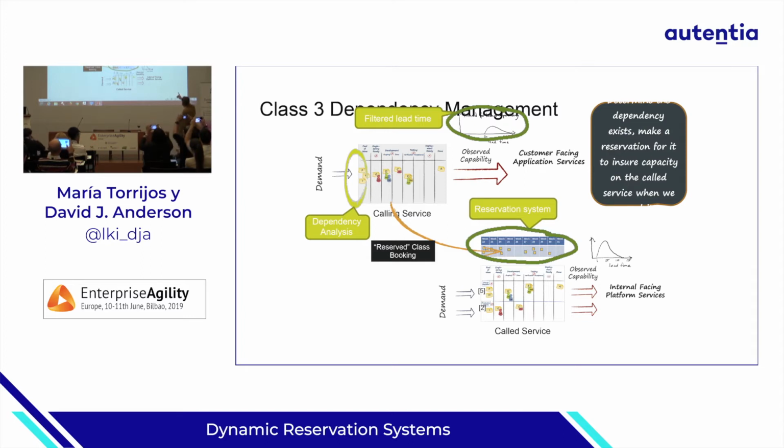All right, so now we want to make a reservation on the shared service to ensure it gets dealt with promptly, which means that on the front end, we need a little bit of risk assessment to say, is this something we care about, and what do we think the probability is? Now, it could be a very simple probabilistic assessment. This is a campaign coming from, let's pick a customer, Iberian Airlines. And there's a 50% probability that when Iberia asks us for an ad campaign, we actually need to do custom photography. So with a 50% probability, we need a reservation for the photographer.